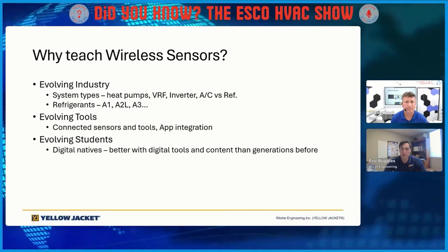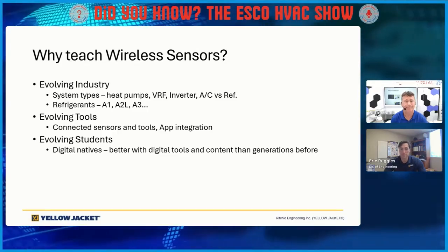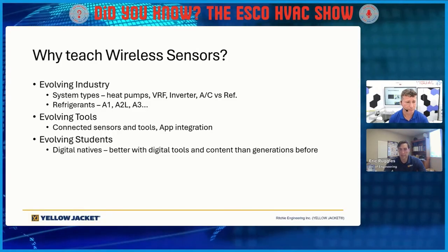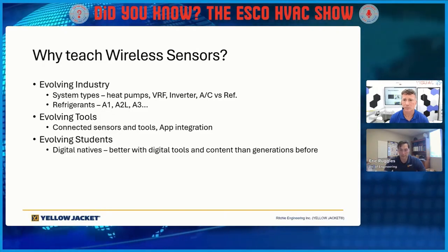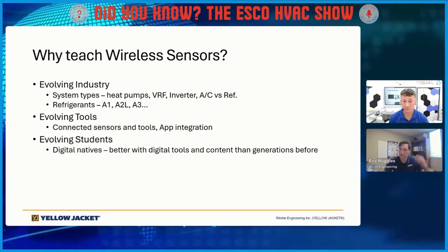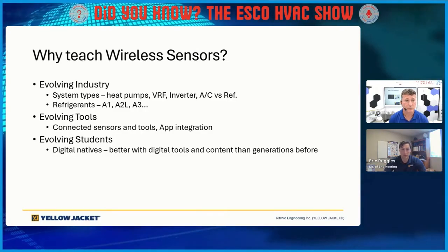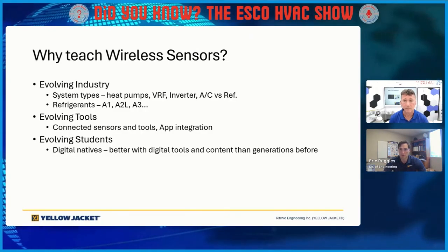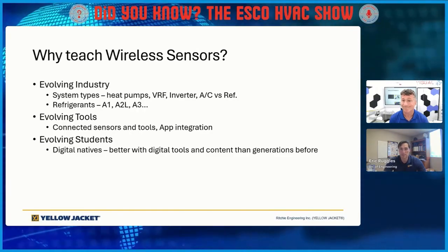I've heard of manufacturers talking about requiring commissioning reports for warranty requirements, that sort of stuff as well. Yeah, absolutely. You connect the sensors and you take a snapshot or report, and then it's done. It saves you a ton of time on our end. It also makes you confident that your installation was solid and it's meeting the performance requirements that the equipment states as well, and we're all on the same page for the job site.